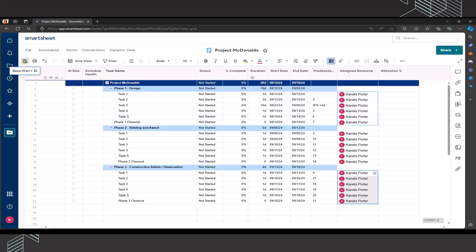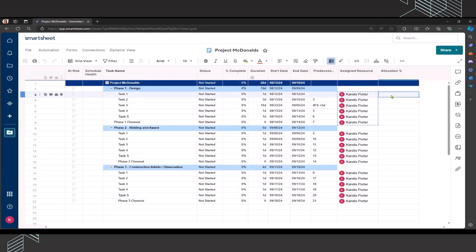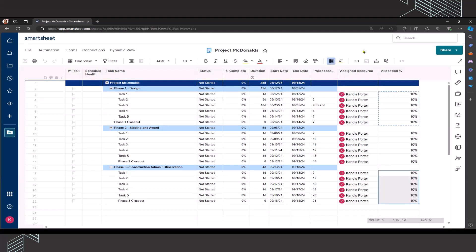Once I have all resources assigned, I'm going to click save. I know that I'm currently working on other projects and that I'm going to be assigned to project McDonald's at 10%. And I'm going to click save.